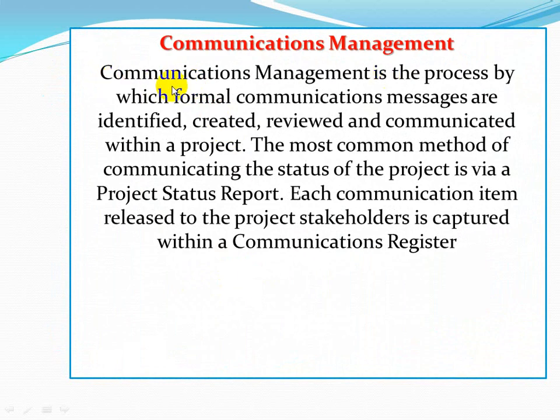Communication management. Communication management is the process by which formal communication messages are identified, created, reviewed and communicated within a project. The most common method of communicating the status of the project is via a project status report. Each communication item released to the project stakeholders is captured within a communication register.